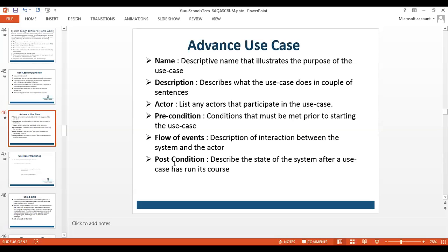And then whenever you update this use case diagram and an Excel sheet, that's the overall first version of the requirement. So whenever you first upload, that's the first version. It's called draft release. Whenever somebody approves it, it's called first release. After approval, it's the first release. So normally a release is labeled as X.X.X.X. So there are 4 X's with dots in between. This is called the release number.